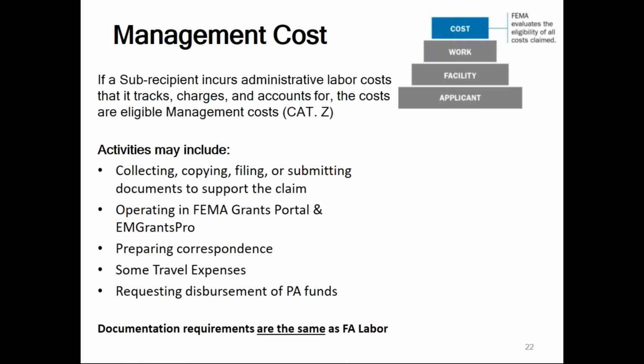Management costs are something you as an applicant can claim. By management costs, I'm referring to those costs that you are incurring as a result of spending time managing this grant program. It is not meant to be management costs for you as an employee for coordinating time and schedules for your employees to be out in the field or responding. Those are specific project Category B costs. Just be sure that you understand that management costs are for managing the time spent on this grant. FEMA will write a Category Z project for you, capturing all your management costs, the time spent managing this grant. This will help reimburse you for hopefully most of your time for doing so.